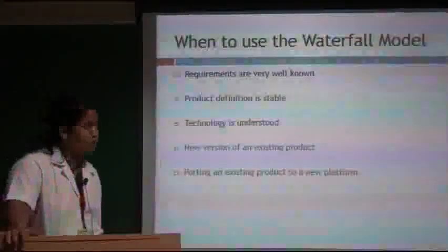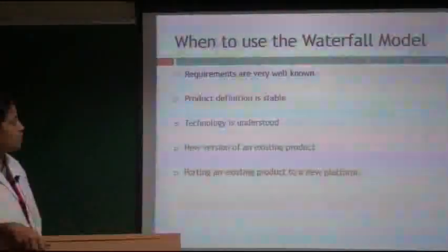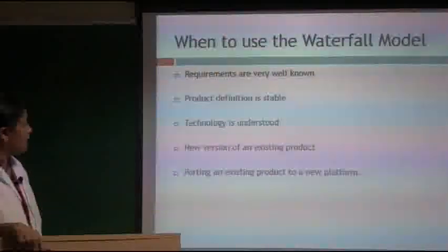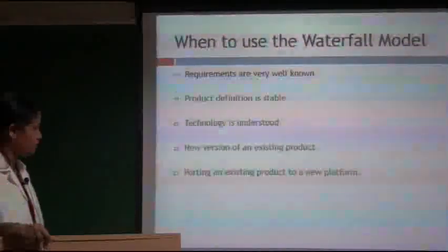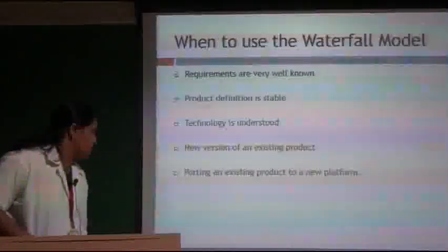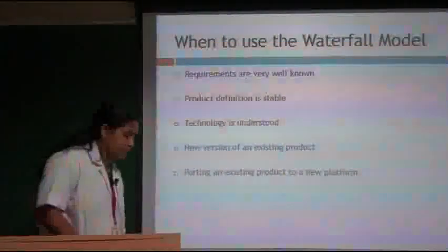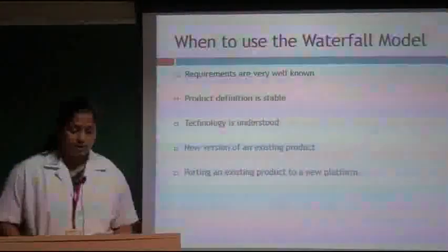When to use the waterfall model? When requirements are very well known, the product definition is stable, and the technology is understood. It suits a new version of an existing product, or porting an existing product to a new platform. So the waterfall model can be suitable.